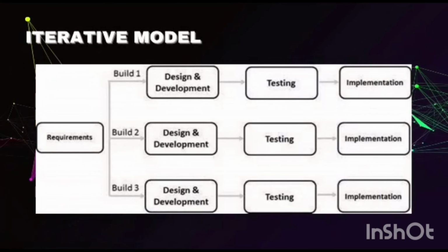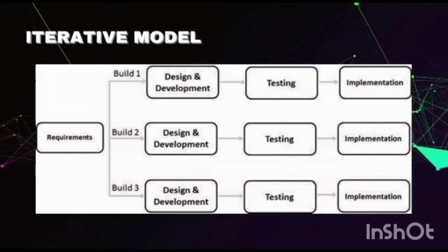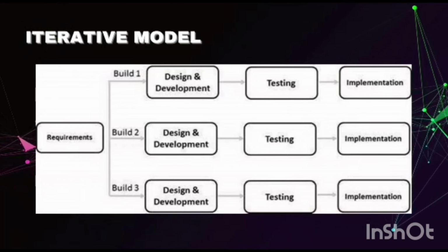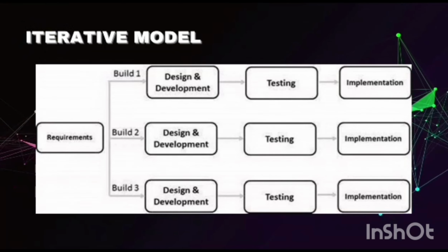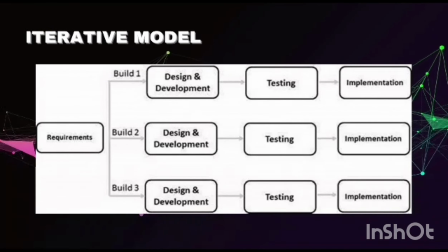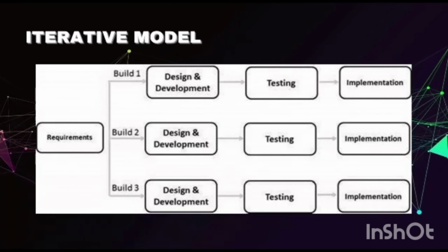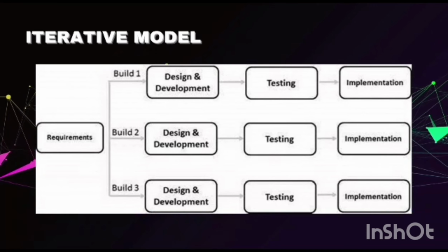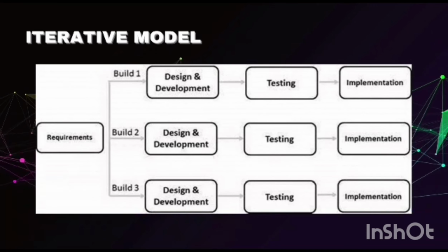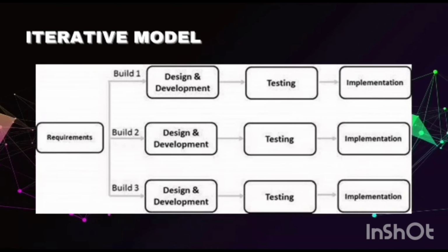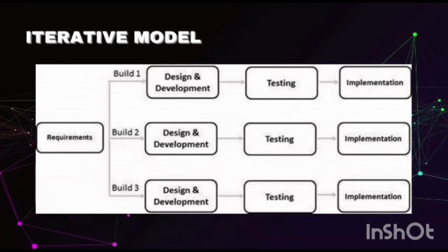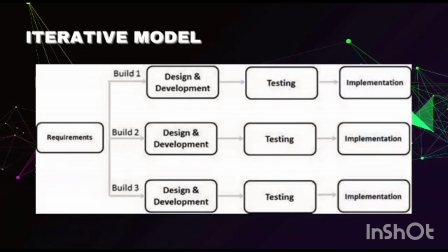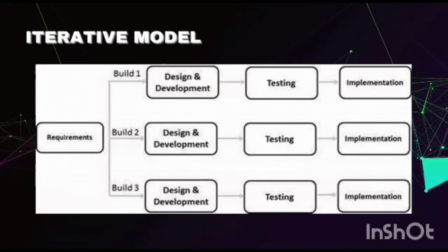Iterative model application. Like other SDLC models, iterative and incremental development has some specific applications in the software industry. This model is most often used in the following scenarios. First, requirements of the complete system are clearly defined and understood. Second, major requirements must be defined, however, some functionalities or requested enhancements may evolve with time. Third, there is a time to market constraint. Fourth, a new technology is being used and is being learned by the development team while working on the project.